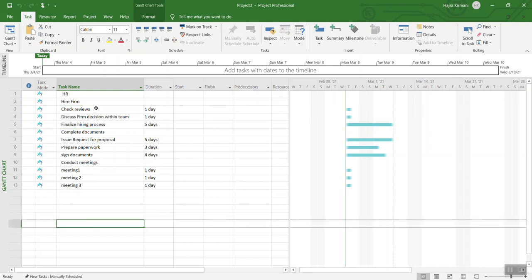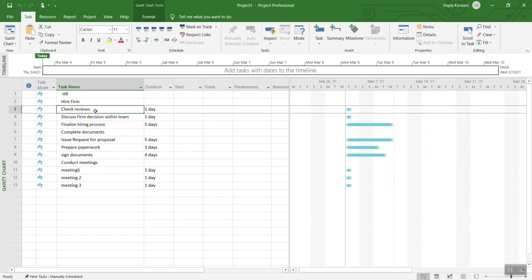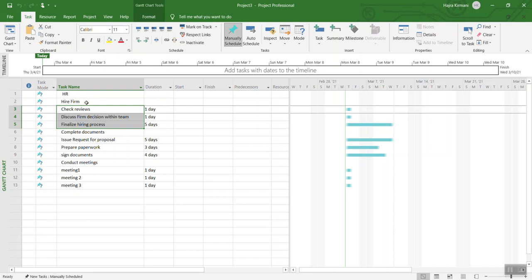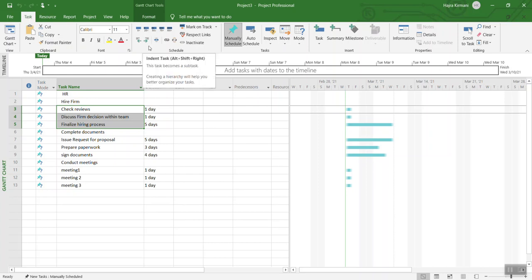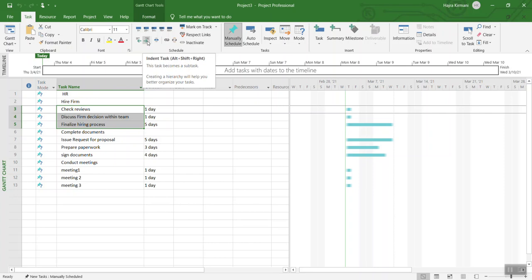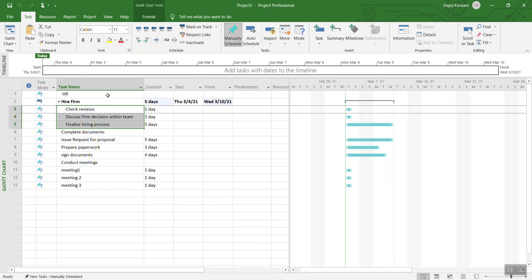What we are going to do is the quick organization of these items. I'm going to highlight three items which should fall under hire firm. In my menu over here, I'm going to go to Task and click on this right arrow, which will make hire firm the owner of these three items.